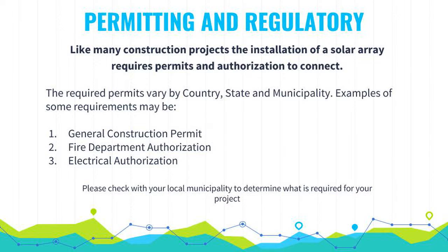Like many construction projects, the installation of a solar array requires permits and authorization to connect. The required permits vary by country, state, and municipality. Examples of some requirements may be general construction permit, fire department authorization, and an electrical authorization. Please check with your local municipality to determine what is required for your project.